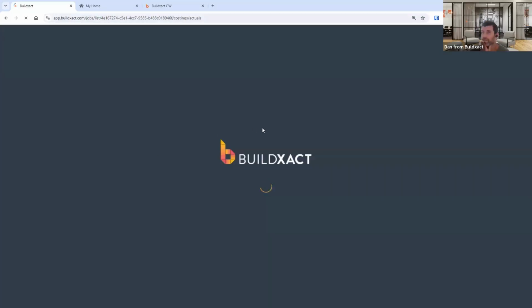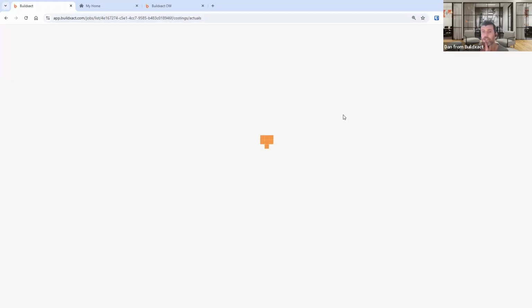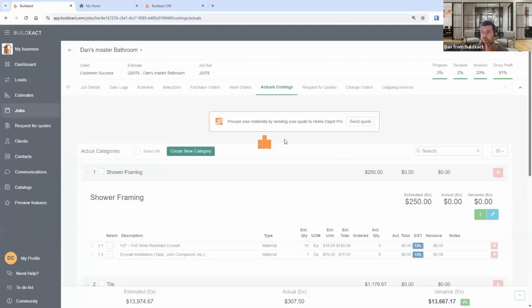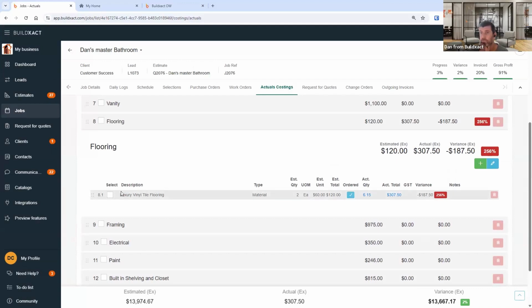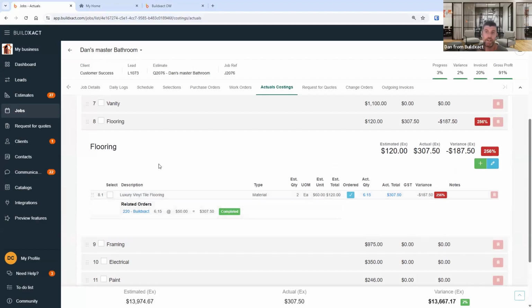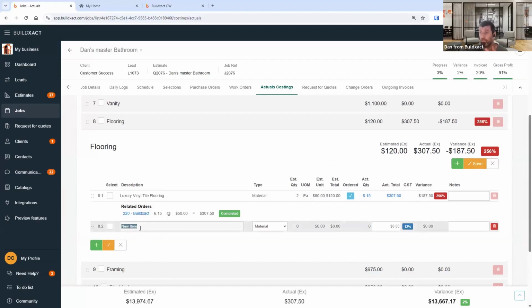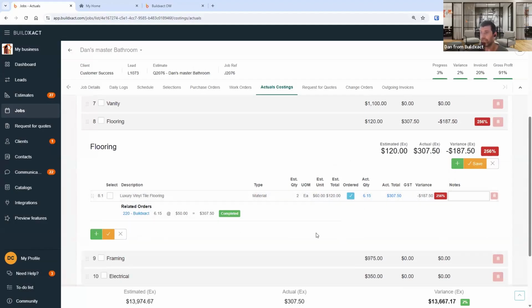In fact, you may have even typed that before I assigned the timesheet, but let's show you here. So I put that against flooring, and because I picked the specific line, it matches to a specific line. Like I said earlier, if I didn't pick that line, I would just get a new line below for labor, who did it, etc. And I'd then just look more at the variance over the category. But I kind of think if there's a line there to compare it to, you should compare it to that exact line. So to answer your question, yes, you can direct compare it.